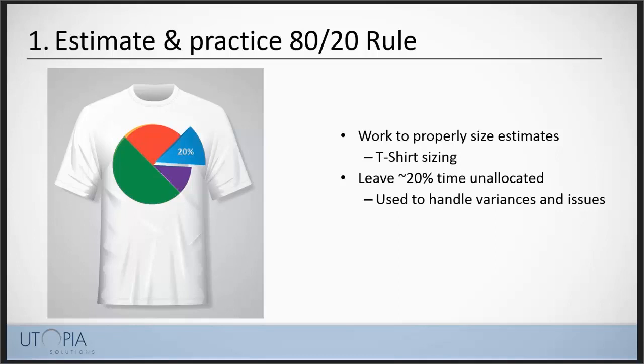Maybe your QA team member sees the testing burden as very, very complex. There's a lot of data setup, but your development team member sees it as very quick and easy to develop this framework functionality or this framework deliverable. So it's really important, if you want to get the estimates right, to get everybody talking about all those factors.